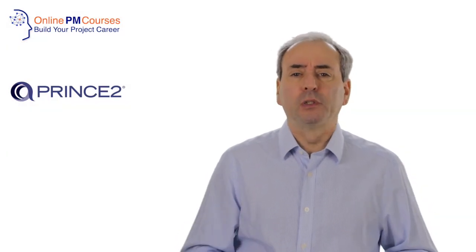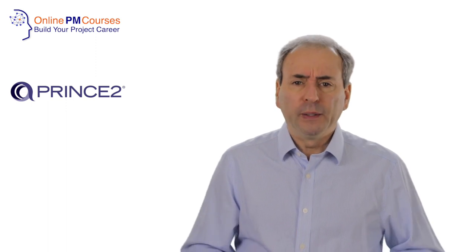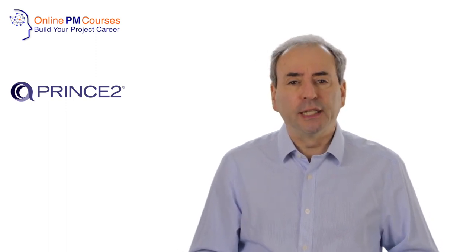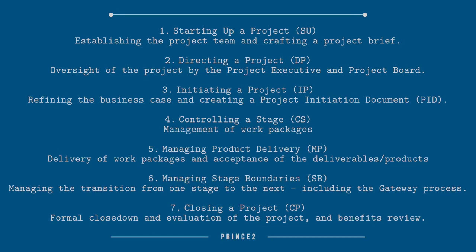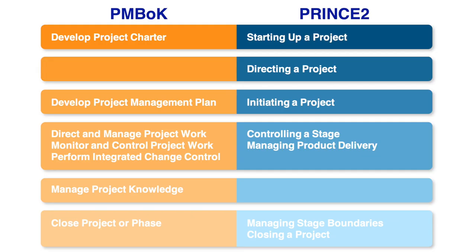PRINCE2 also has seven project processes. These seven form the whole set of project processes within PRINCE2, and I think they all define project integration. The first is starting up the project, then directing a project, initiating a project, controlling a stage, managing product delivery, managing stage boundaries, and finally closing a project. I'll put up on screen now an image which shows how we might compare the two frameworks, and you should be able to see clearly how similar the two frameworks are even though they use very different terminology — and the fact that PMBOK identifies all of these as project integration whilst PRINCE2 effectively says this is how you do a project.